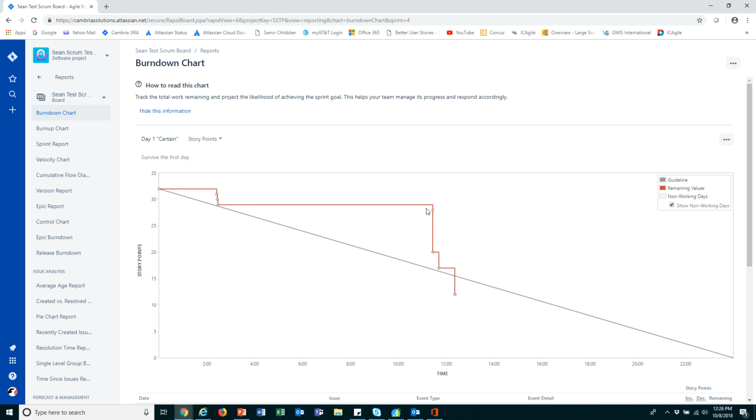If we hang up here too long above it, it kind of means that we've stalled out a little bit. Key information for any Scrum Master to then go have a conversation with the team and say, hey, our stories have stalled and we're not making any progress on them. What's going on? All right, and begin to have that conversation. Everything may be totally fine. It's just a point for a conversation.